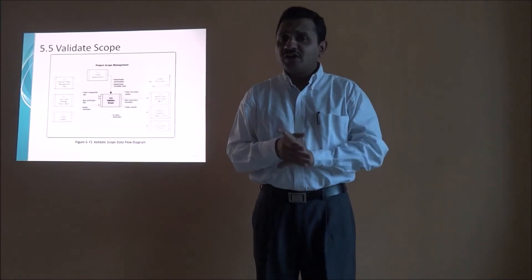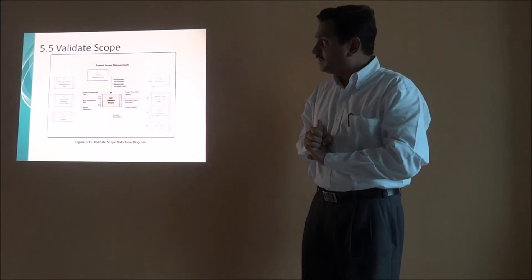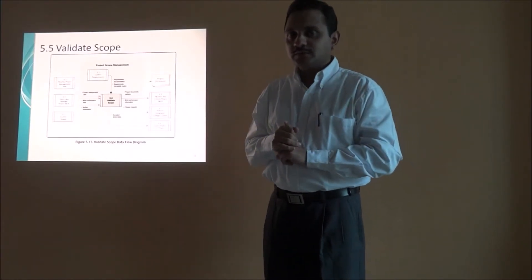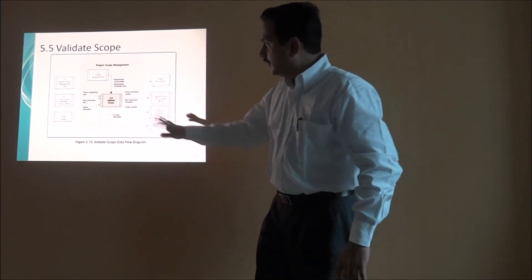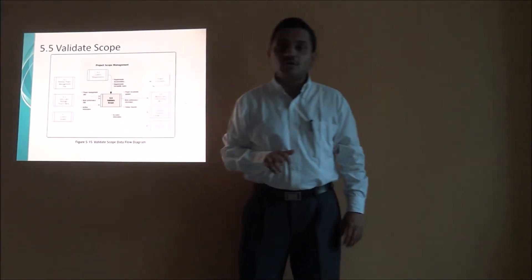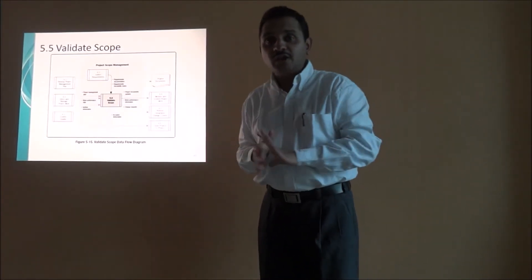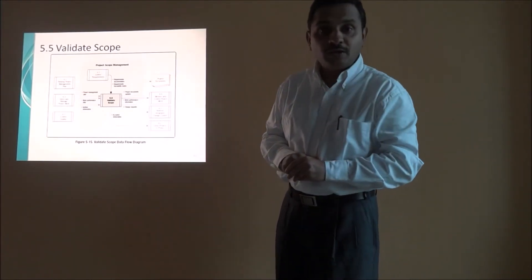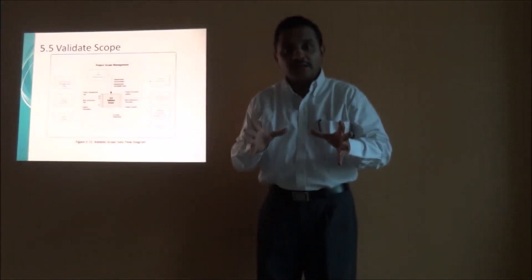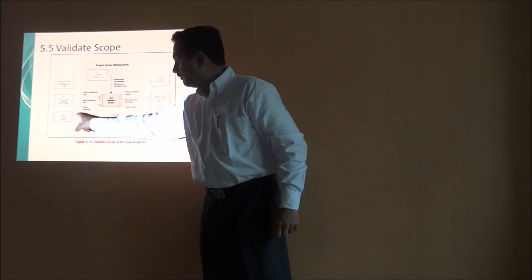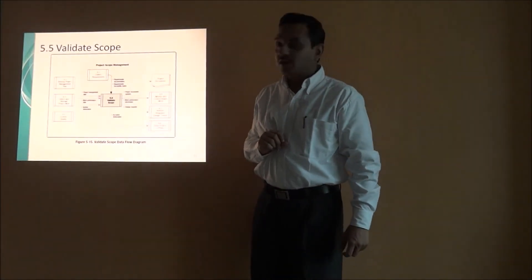Now you heard the story. Let's understand the data flow. Mrs. De Souza had come for acceptance of the flat. Before that, the quality control department had already come and inspected the flat. Look here — the input to Validate Scope is Control Quality. That means the output of Control Quality, which is the verification of the deliverable — here the deliverable was the flat itself — feeds into Validate Scope. When Mrs. De Souza came, verified deliverables had to be there for her to accept. So Control Quality feeds verified deliverables into the Validate Scope process.